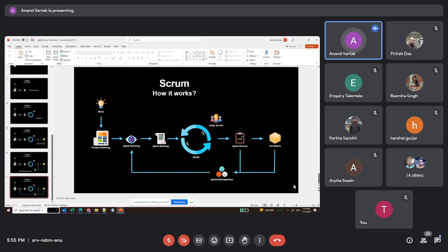We'll create a sprint in a tool, and then we add the requirements to that sprint. Then again, we'll go ahead, we will have all these ceremonies, then we'll come back. Then again we will have a set of requirements, that is the second set. We'll again implement those requirements in this second sprint. Again this will increment, again will deliver, and again this will continue till we have all the requirements covered. So that is how a sprint is implemented.